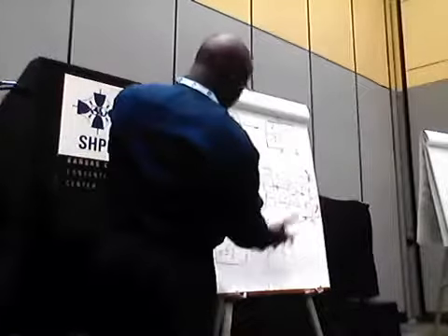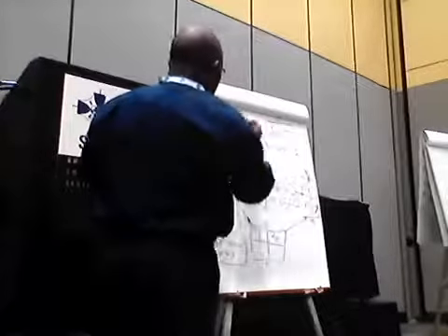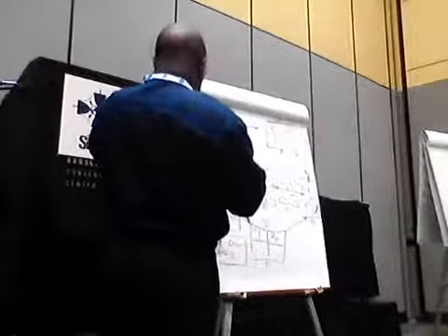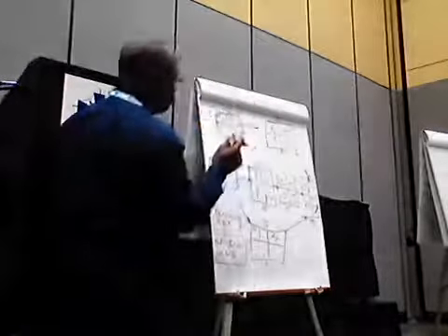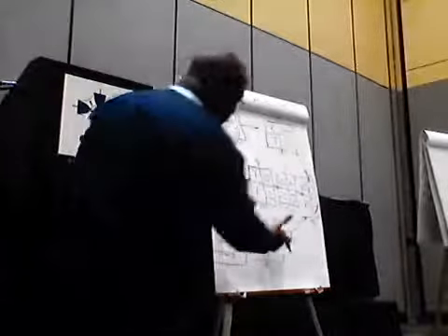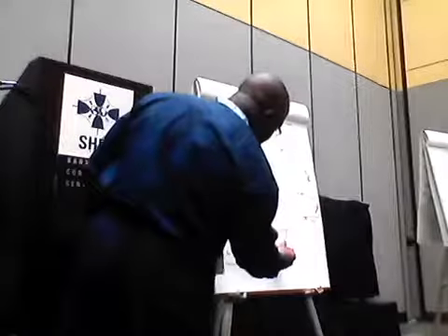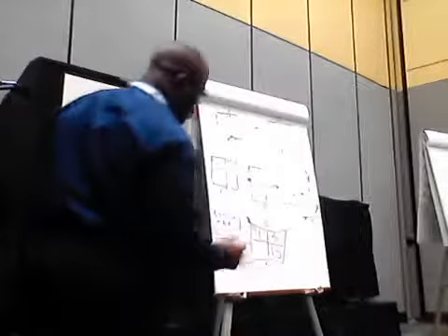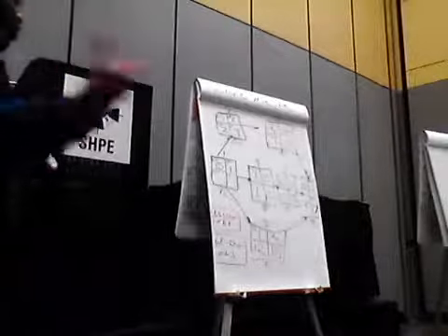We're going to try and do everything else so that we can see what we've got. The 9 is going to go here. 9 minus 7, 2. And this one, we're going to take the 15, put it here. 15 minus 3 is 4. Good. Now, folks, going forward, we use logic to see this is dependent on this, this, and this, so we have to do the one with the highest number.